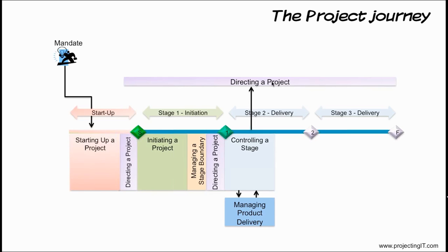The project board will inform the appropriate authorities within the organization with those lessons so that they can help improve the method for managing projects. The project manager, as part of controlling a stage, will also control scope and ensure that ad hoc scope creep doesn't happen. Project manager will receive the change request, will use issue register to track all issues identified during the stage, and will monitor and control risks using the risk register.